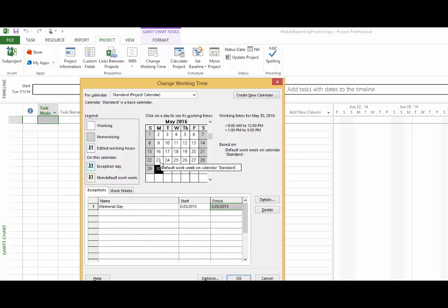So if you make May 25th the yearly off day, then it goes to Wednesday next year. So my suggestion is, for those holidays that fall on a certain day of the week, do not use this recurrence pattern.